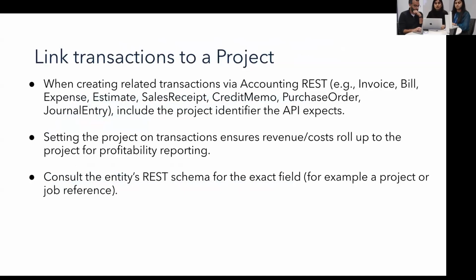We have multiple other use cases as I mentioned before. So you can link all of your transactions to a particular project for profitability reporting. So while creating any related transactions via your REST API, let's say, for example, you're creating an invoice, you ensure that you pass the project identifier to the API so that all of the transactions that you make are linked to that particular project, and it would be easy for the project owner to track all of them.